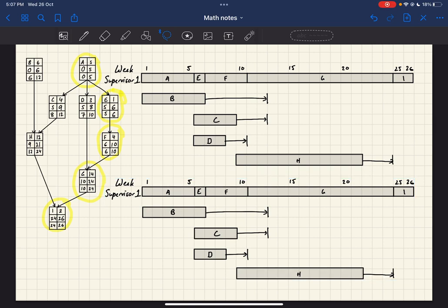So we're going to put task C after task B, because C can shift over 1 and now go here and then move up to this part here, so that a supervisor can watch B and then immediately supervise C. So we're going to take this, erase this, because we're going to have C straight after it. That now goes there.